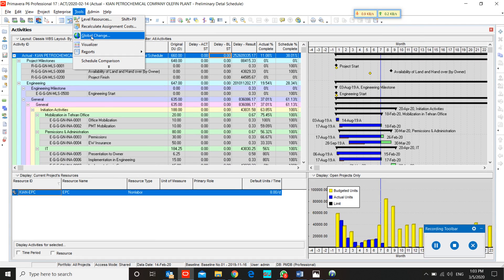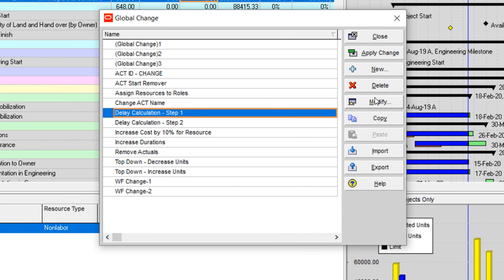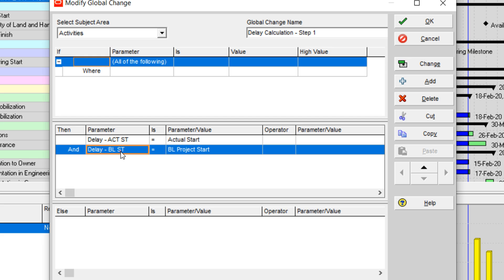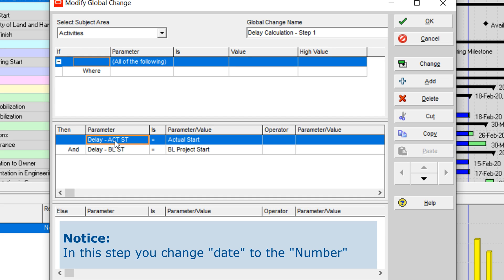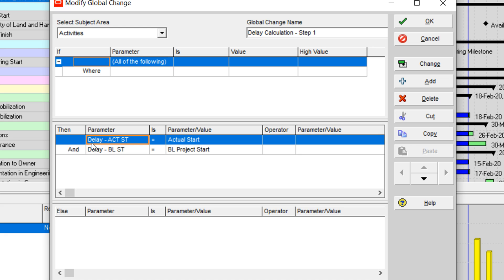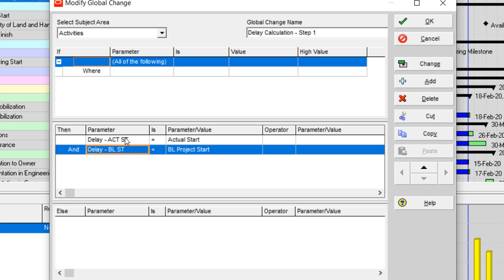It only has three steps. Step one is the delay calculation. In this step, we change our date to the user defined field and change the date to a number. As you see, delay actual start equals actual start — this step changes the date of our activity to a number. We change the date to number for both actual and baseline.